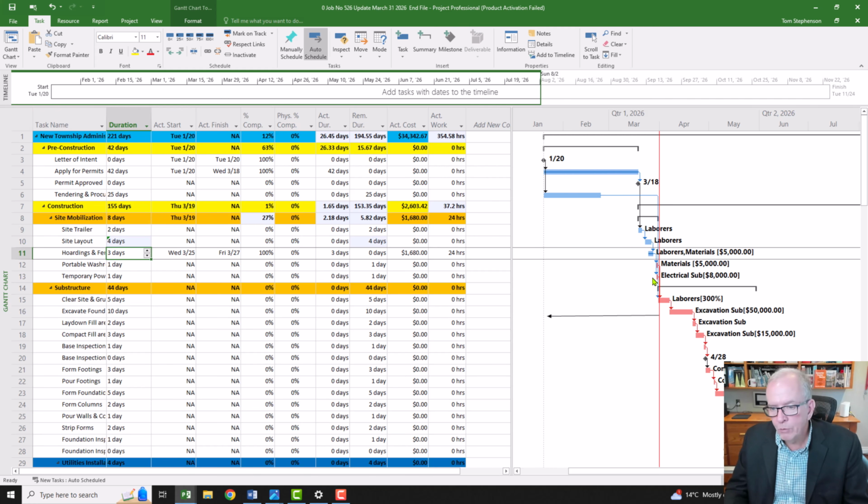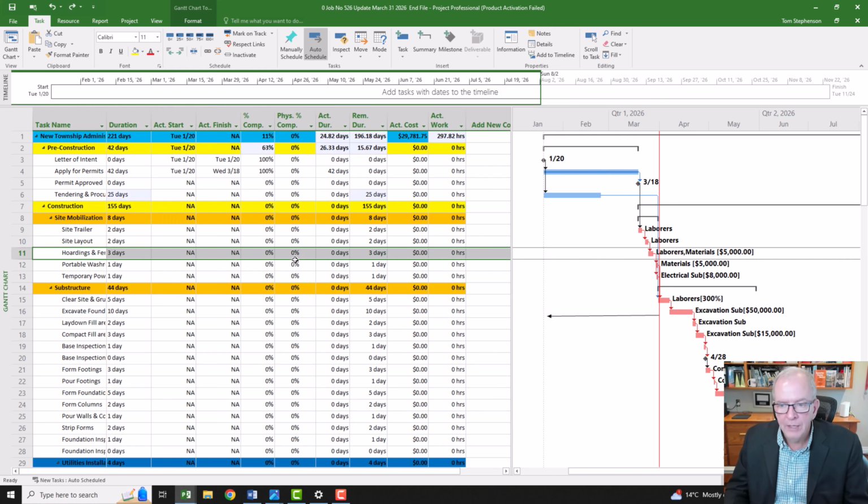And the whole idea with the critical path, as we've discussed, is that you want it to be able to push things out the way they happen. So I'm just going to undo that. Control Z twice to undo that, because that's not what you want to do. And that's basically why I say in the checklist, work from the left of the steady state, starting from the earliest date, working your way forward.